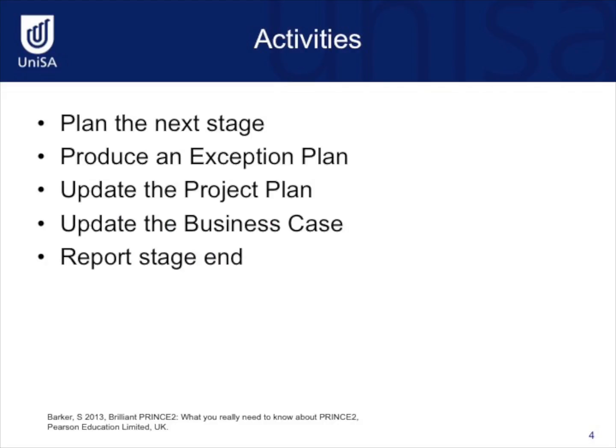Here is a summary of the activities that must be carried out during the managing a stage boundary process. We must plan the next stage, produce an exception plan if necessary, update the project plan, update the business case, and then report the end of the stage.